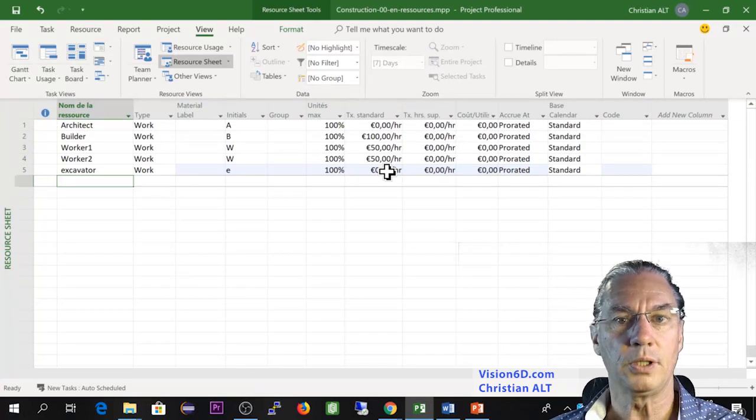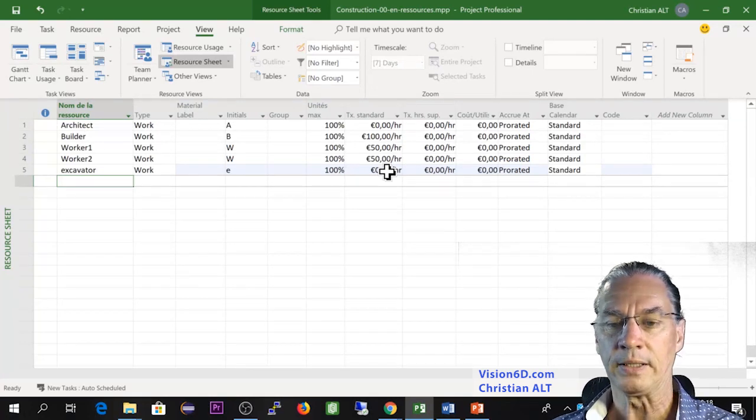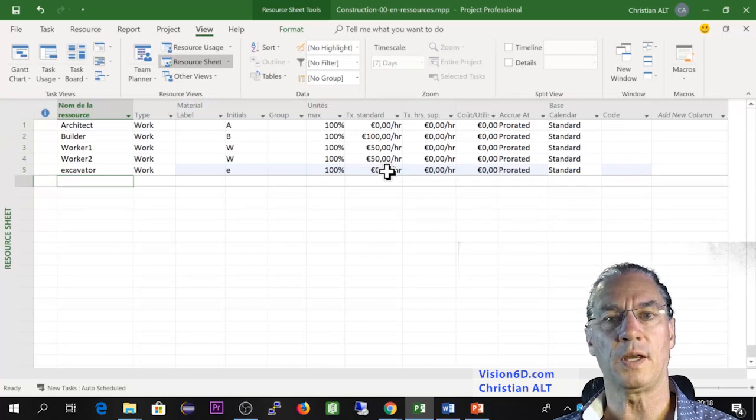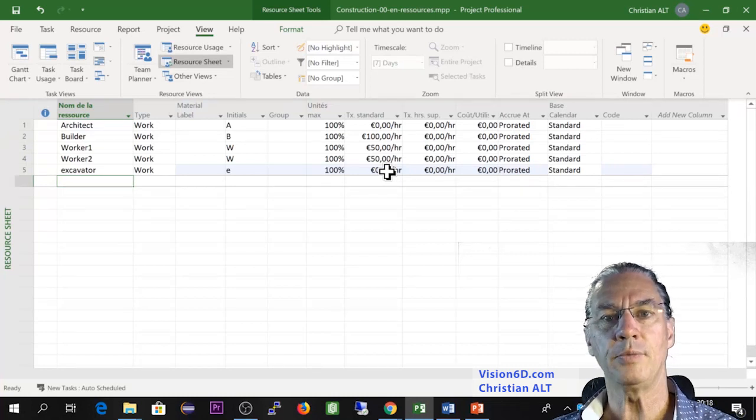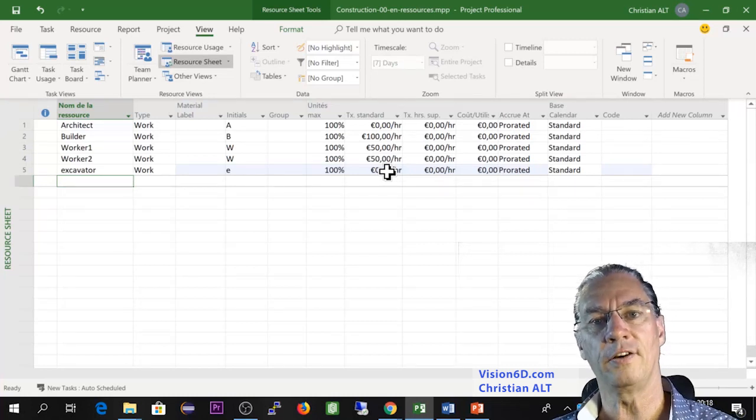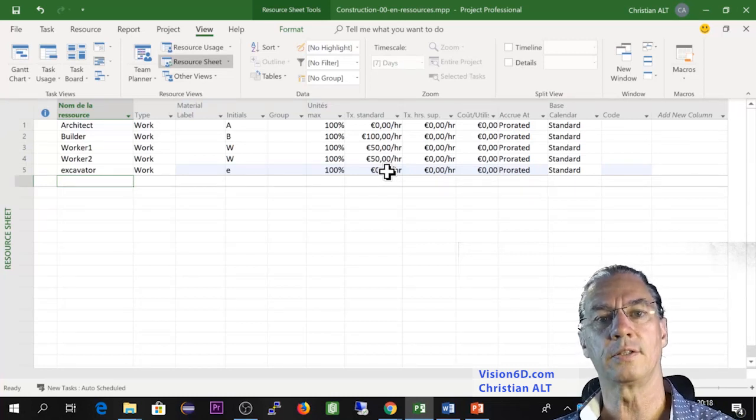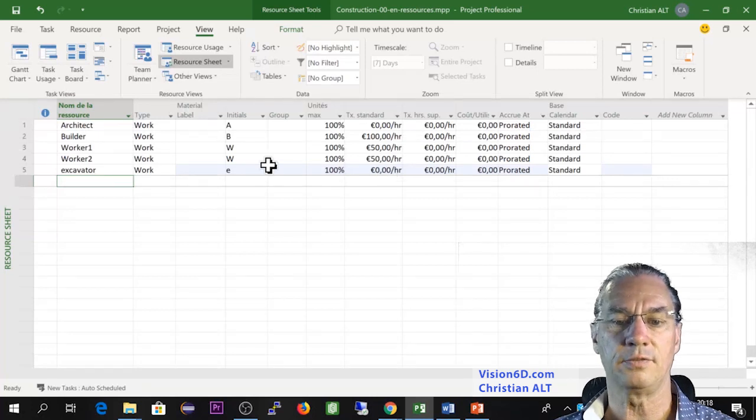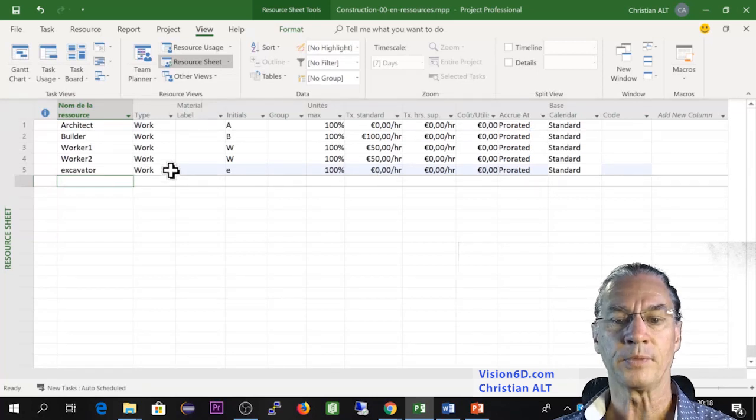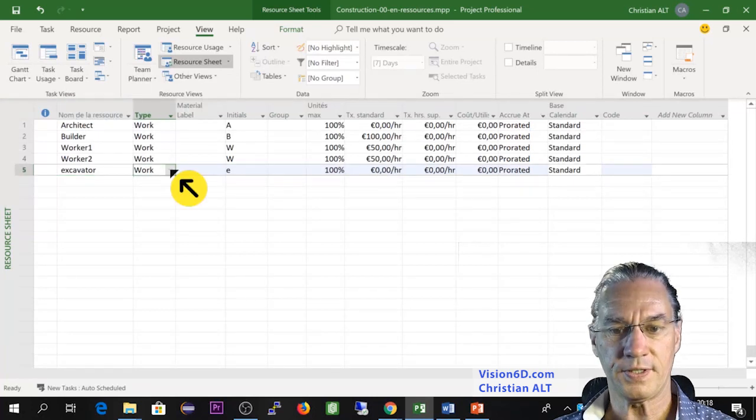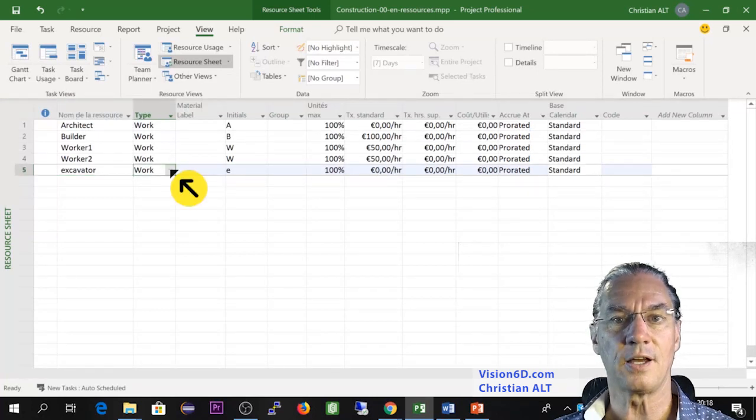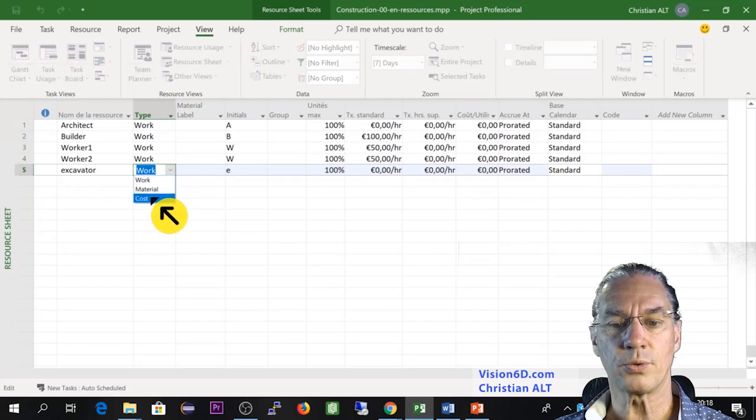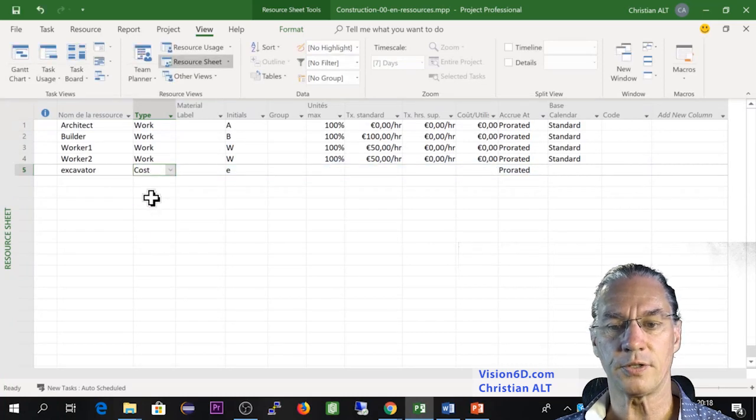But of course it could be a solution where you say your excavator, you pay a certain rate per hour. This could be a solution. In my case, I'm going to say no. I'm going to pay a flat rate for the two days that I'm going to use that excavator. So for this, since it's a flat rate, it is a resource of type cost.